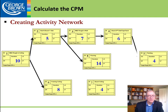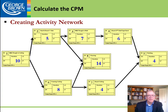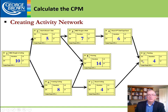We click through step by step, putting in the predecessors and successors shown on the previous slide to show all the connections. Looking at that, can you see a problem? Flooring does not have a successor activity — that would not be following best practices. So we want to include that. Now it's connected and the network is complete.